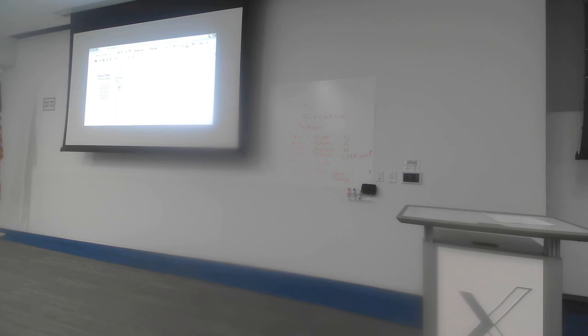All of these other paths, compared to the overall project duration, which is the duration of the critical path, they all have a little bit of slippage, meaning that they have a little bit of leeway that if any of those different tasks slip a little bit, the overall project duration won't slip. So the overall project duration is the normal duration of the critical path, which is 20 days.